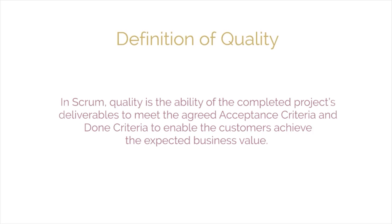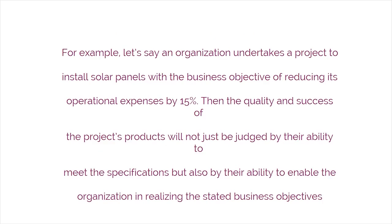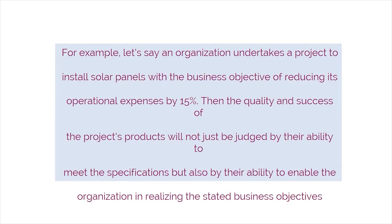Now, let's look at how Scrum defines quality. In Scrum, quality is the ability of the completed project's deliverables to meet the agreed acceptance criteria and done criteria to enable the customer to achieve the expected business value. For example, let's say an organization undertakes a project to install solar panels with the business objective of reducing its operational expenses by 15%. Then the quality and success of the project's products will not just be judged by their ability to meet the specifications, but also by their ability to enable the organization in realizing the stated business objectives.